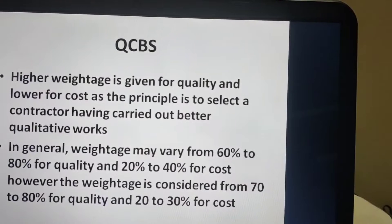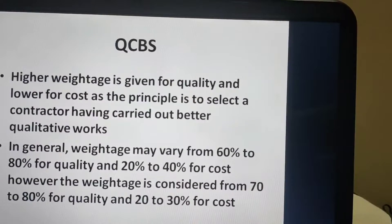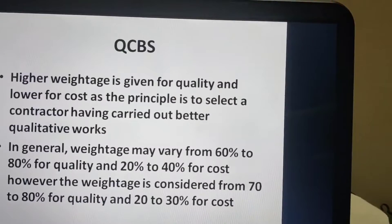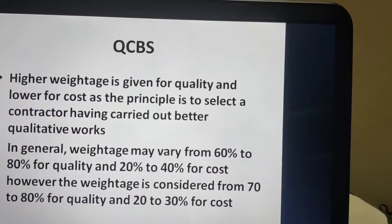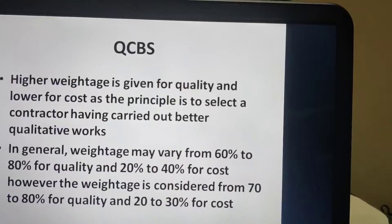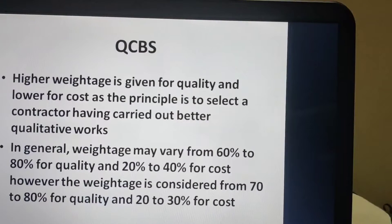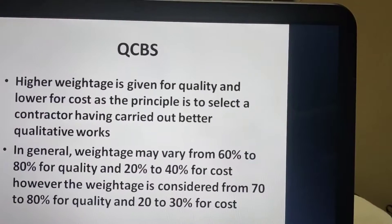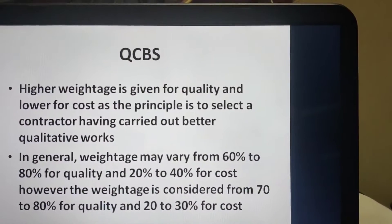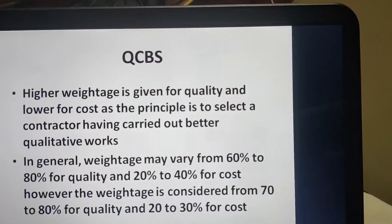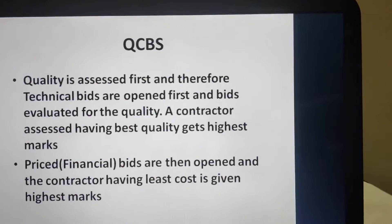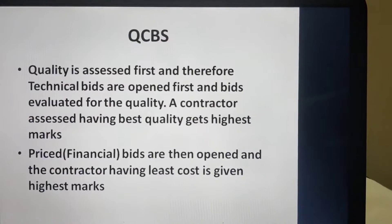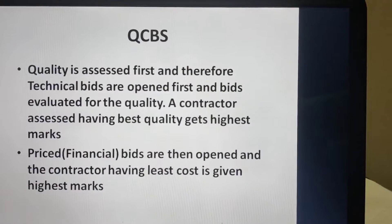In general, weightage may vary from 60 to 80 percent for quality and 20 to 40 percent for cost. However, in our country India, the weightage is generally considered from 70 to 80 percent for quality and 20 to 30 percent for cost. Quality is assessed first and thereafter technical bids are opened and evaluated for quality.